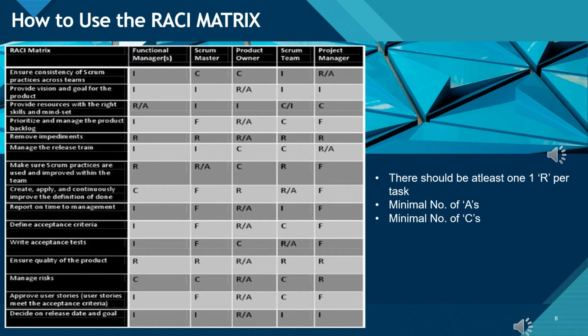Now identify the RACIs for all the tasks as in the image and construct the matrix. Once done, socialize or distribute it among the participants or the non-participants who were there in the meeting when we made the RACI matrix, and get proper feedback. Revise the chart if changes are advised. Agree on a final version.